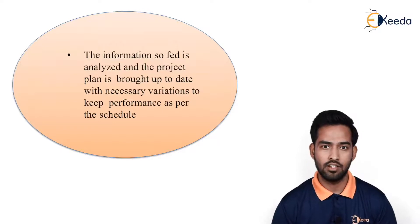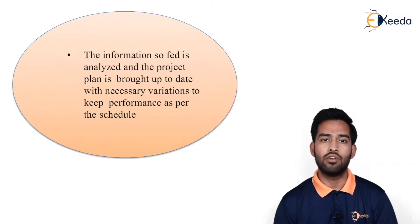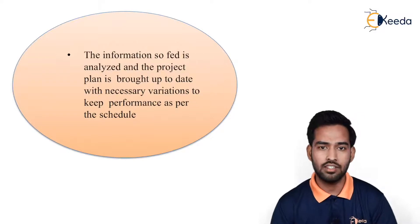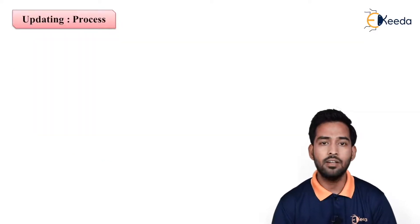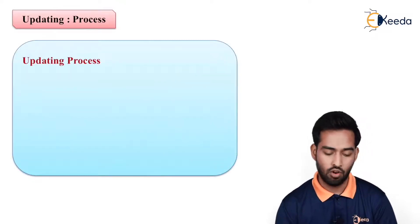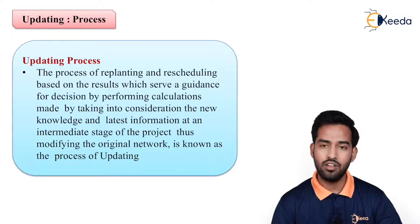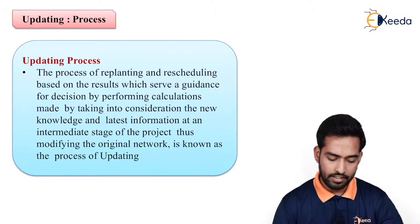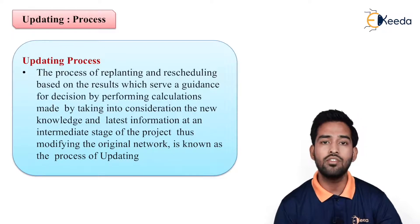For example, if activity B is delayed by 4 days, and the float is not available because that activity is a critical activity, we can increase the number of resources so that the future activity can be taken under control. The main part is the updating process — how we go for updating and what is the process involved. The process of replanning and rescheduling based on results, which serves as guidance for decisions by performing calculations made by taking into consideration new knowledge and latest information at an intermediate stage of the project, thus modifying the original network, is known as the process of updating.